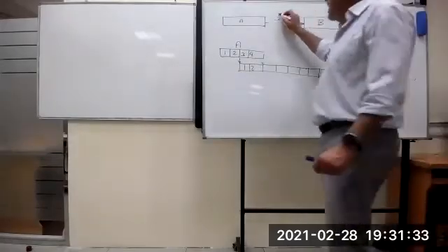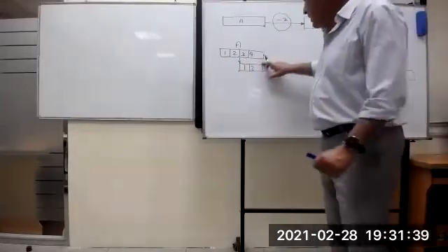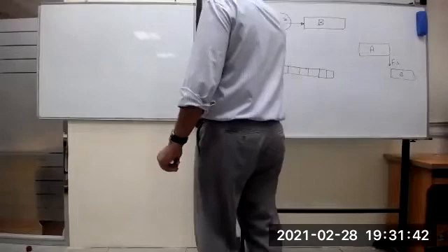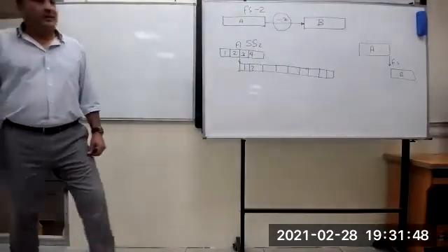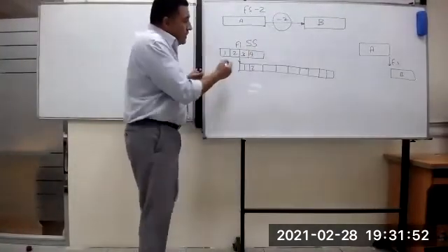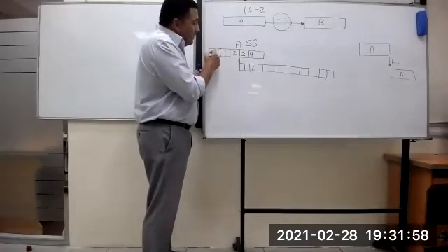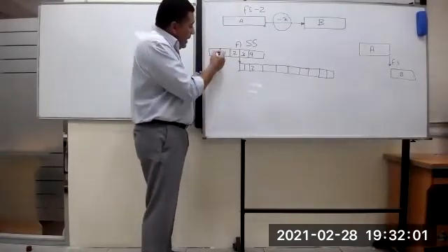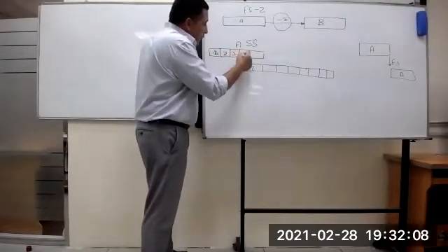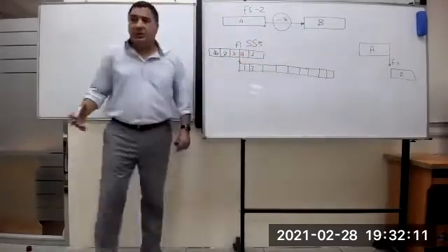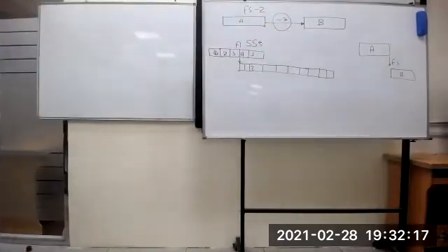The trick here is the minus. Minus 2 days. Actually, we can put it as FS minus 2 or SS2, both. It's not 2 in every case. This relationship is 2 because the activity is 4 days. But if the activity is, for example, 5 days: 1, 2, 3, 4, 5, then it is SS3. Each condition is the same. You got to the point now?